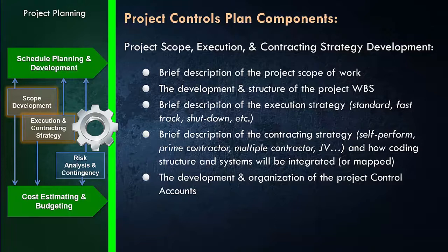They are basically the control points within your WBS where you measure and monitor performance and collect actual cost. So it's very important that you determine the control accounts early on in your project, and it's best to address in your project control plan the organization of the project control accounts and how you're going to develop them. So make sure that you address them in your project controls plan as well.